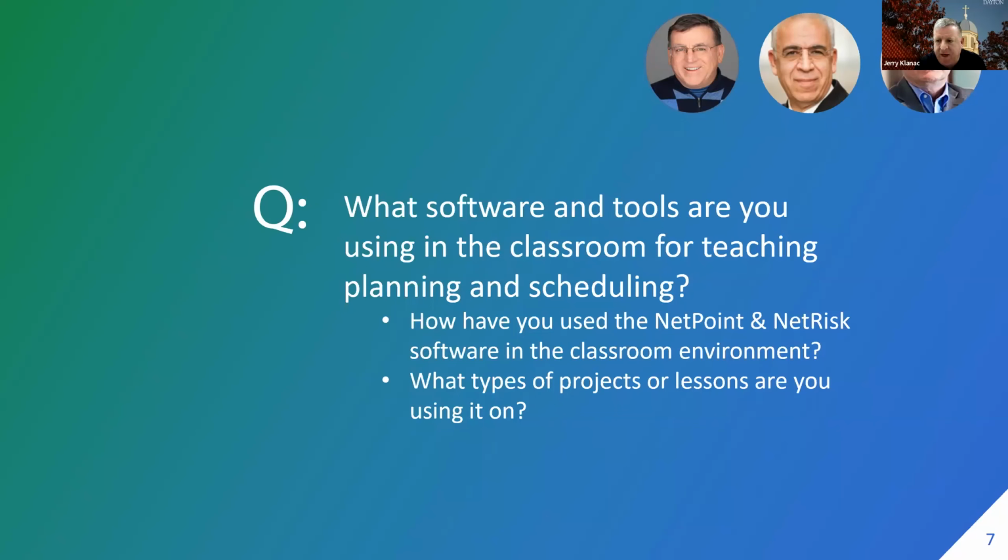And then I introduced the key concept of the possibility of floating or float use into that schedule and what that may do in the envelope of outcomes that could happen from the simulation results that you get. The whole exercise there is to build the model, run the simulation, and then interpret the results. Students really love getting their hands on new tools and doing something different than what they've seen before. They now realize the importance of doing a schedule risk analysis, knowing that there is possibility of different outcomes than what is shown in the base schedule, which is deterministic based.